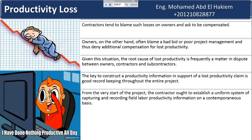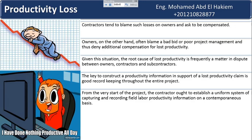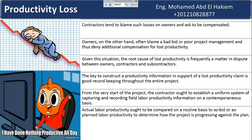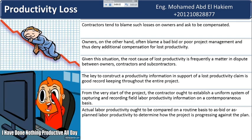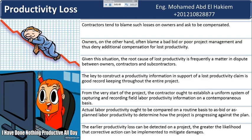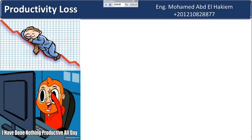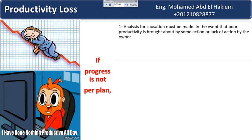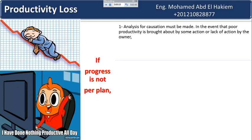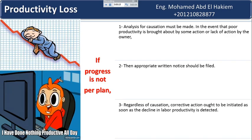From the very start of the project, the contractor ought to establish a uniform system of capturing and recording field labor productivity information on a contemporaneous basis. Actual labor productivity ought to be compared routinely to as-bid or as-planned labor productivity to determine how the project is progressing against the plan. The earlier productivity loss is detected, the greater the likelihood that corrective action can be implemented to mitigate damages. If progress is not per plan, an analysis for causation must be made, appropriate written notice should be filed, and corrective action initiated as soon as the decline is detected.